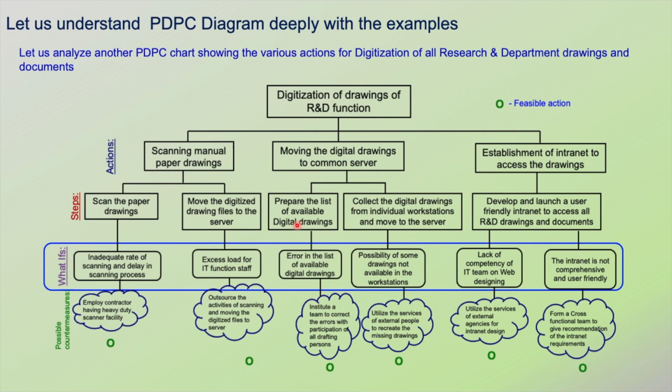Similarly, in the step of preparing the list of available drawings, what could go wrong? Error in the list of available digital drawings. So what could be the solution? Countermeasure: institute a team to correct the errors with the participation of all drafting persons.